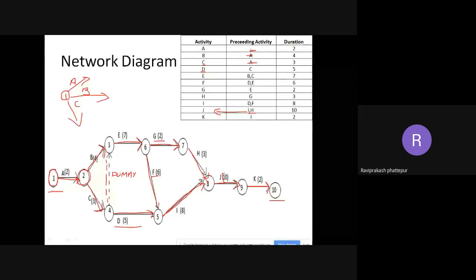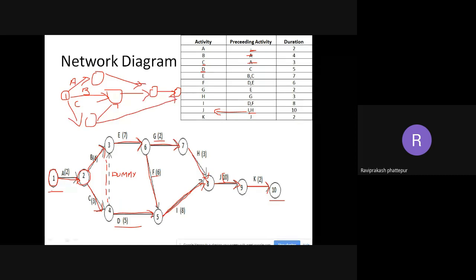But make sure that it starts at only one thing. Then there will be certain things here. Then it will go like this, then here, then it may go and meet here. Something like this, and at the end, if you see, there will be only one node. Or there could be something like this, it could go and come meet here, and instead of meeting here, it may go and meet here. But if you see, there is a merge event at the end here.